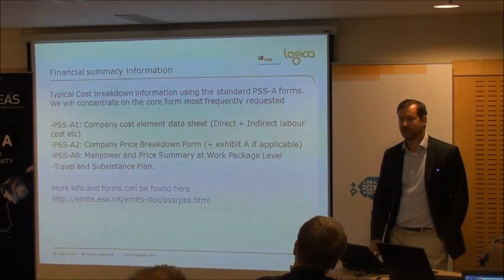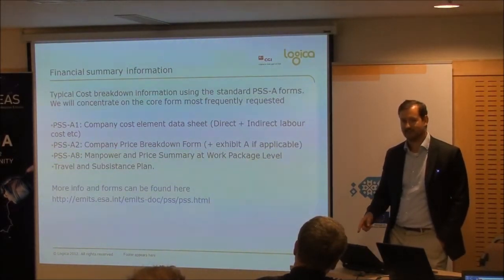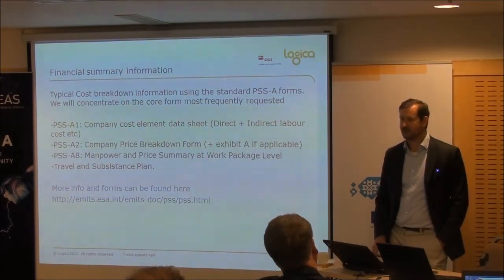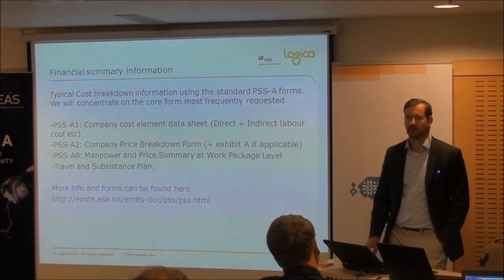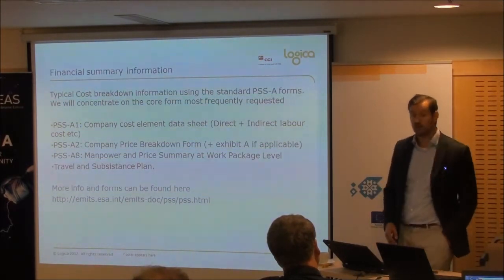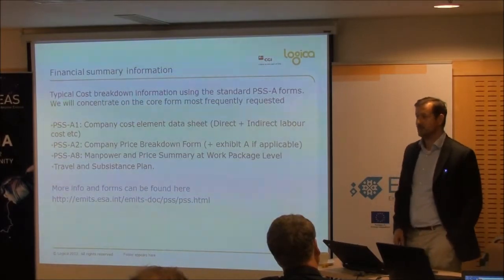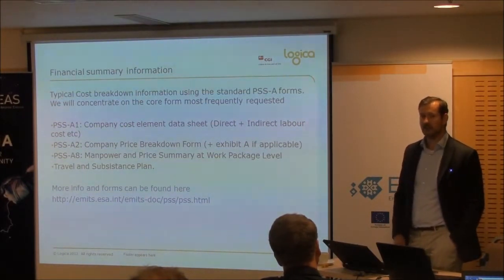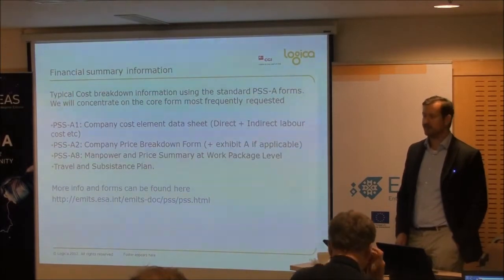And if you're dealing with subcontractors, I'd get them early, because these things need to be signed and handed in signed. So if you've got subs, get them to provide the PSS forms as early as you can get them. Remembering that you will typically have a deadline for shipping. So if you've got a long delivery, let's say it's got to go to Italy or it's got to go to Holland and you're using the post, you're most likely going to lose a week or not far off of that, if you want to abide by ESA's conditions, particularly if you want to play safe,